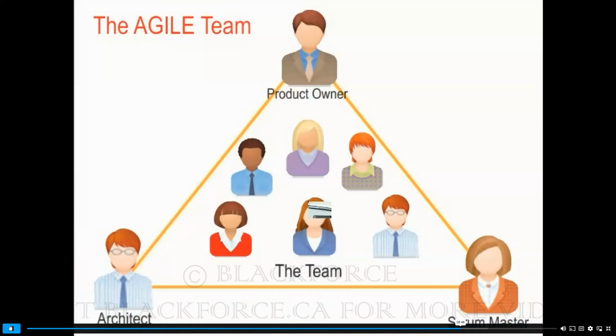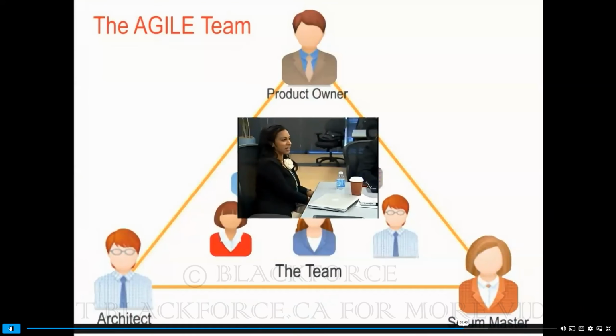Hi, everyone. My name is Summer, and I'm going to be the business analyst on this project. So I'm really hoping to provide just bridging the gap between the product owner and the team. Really want the team to get involved with me in facilitating meetings with the product owner, making sure that we understand the requirements. I understand some things about Agile requirement gathering as far as how to model things and do some other processes. And so hopefully that will help explain to the team what the product owner is looking at. So I'll be working with the product owner to make sure that we have our acceptance criteria 1 to 2 iterations ahead. And hopefully, if you guys need anything at all, I'd love to be here to help.